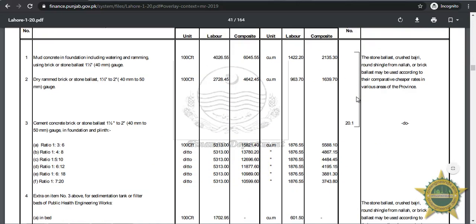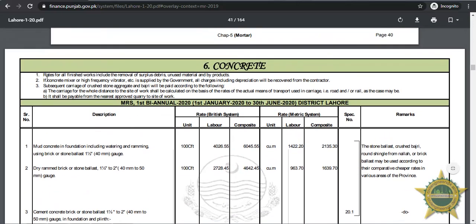Page forty-one is the concrete chapter, and it is written that rates for all finished works include removal of surplus debris, unused material, and byproducts. Any new person using this MRS PDF for the first time is recommended to read these three points before reading the rest.